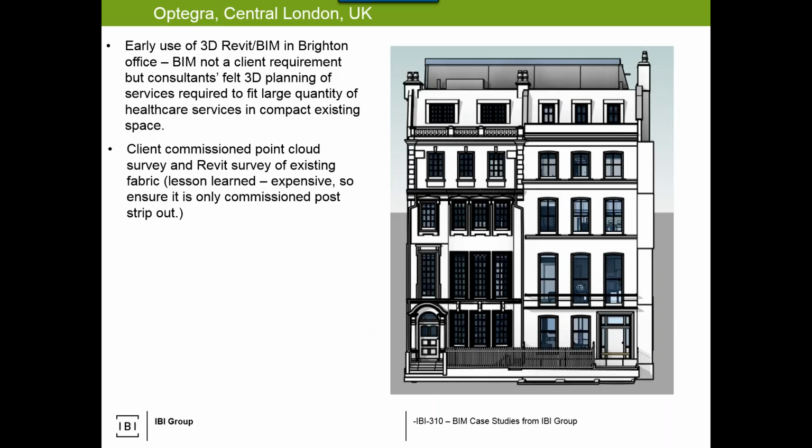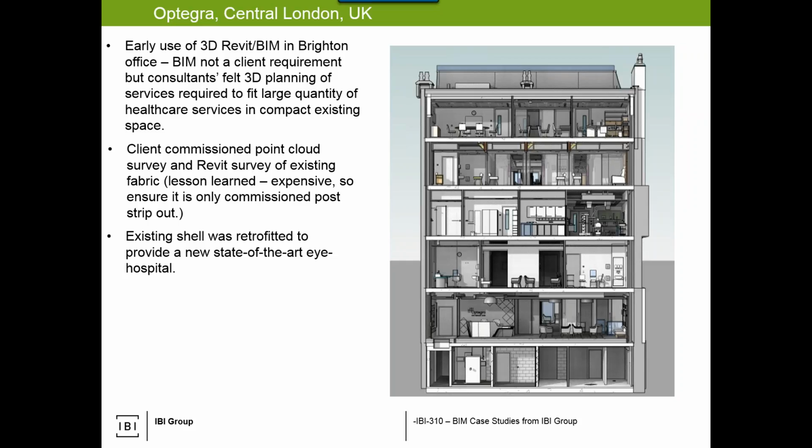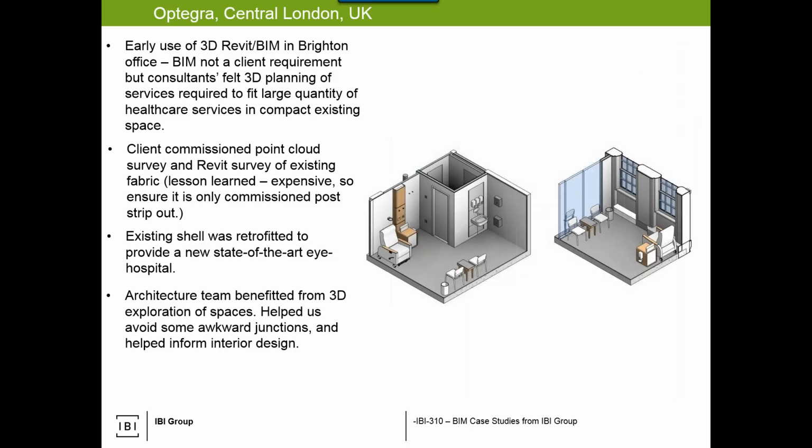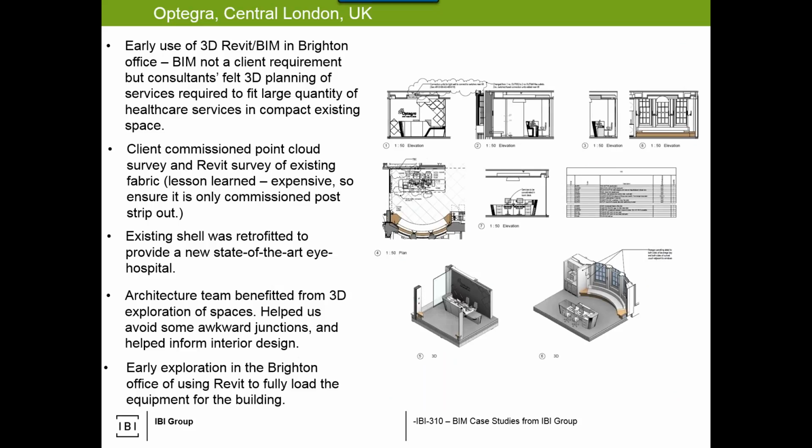Their feedback is to make sure the space is stripped out prior to the point cloud, which is very valid. You don't want to do a point cloud and pay for the interpretation and the BIMing of the point cloud, only for half the components to be gone. The shell was retrofitted to become a state-of-the-art eye hospital, and the architectural team, again using the concept of visualization, were able to analyze different patient room types to understand and explore design options, as well as communicate with the client what can work best within the confines of the existing space to benefit the fit out.